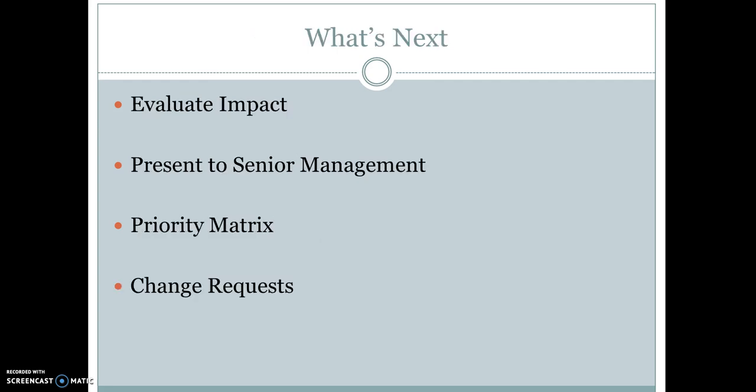Now that Lauren has completed bottom-up estimates for this project, there are several actions she should take. First off, Lauren must evaluate the impact the change in cost and time are going to have on the overall project. We already know the project will cost more and take longer than expected, but additional impacts could exist, such as risk impact and procurement. After identifying the impacts, Lauren will need to consult management immediately and make them aware of the new estimates and how they are going to impact the project.